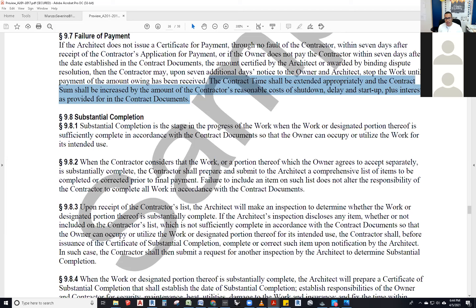Think of a Target store that needs to open by Christmas. Every day they're not open, they're losing money — there are holding costs, cost of money they could have earned. They have a forecast of items to sell and revenue to generate, and every day they're not making that money, the contractor gets penalized for being late — those are liquidated damages. The contractor needs to be substantially complete so the people can use the space safely.